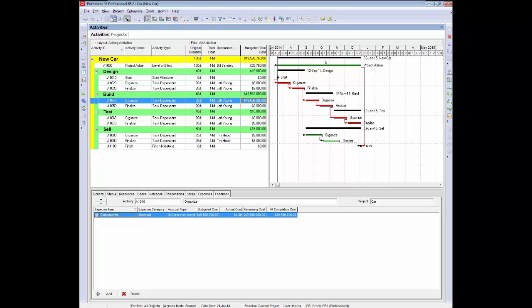So our 3 elements that needed to be optimized have been optimized. So we're now in a position where we can take a copy of this schedule that will be preserved forward into the future. And we call this baselining. So I'm now ready to baseline the project.